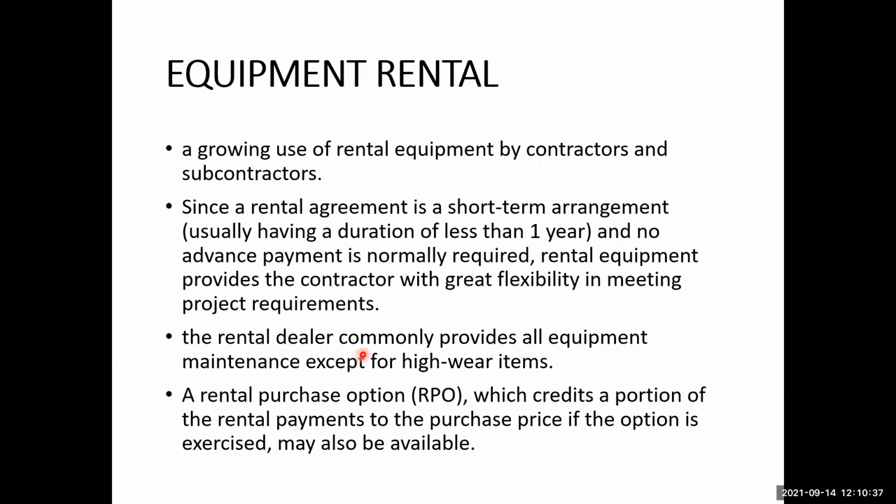The person who is renting out the equipment commonly provides all equipment maintenance except for high wear items. So this is one of the advantages of renting the equipment: the normal maintenance is the responsibility of the person who is renting you the equipment. So you don't have to spend your time and expenses on the maintenance of the equipment. But this is with an exception of the high wear items.